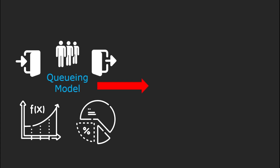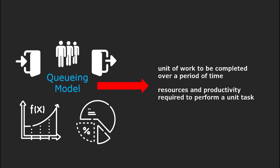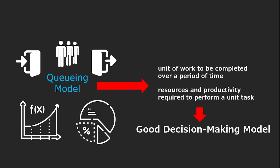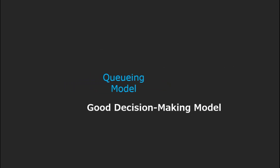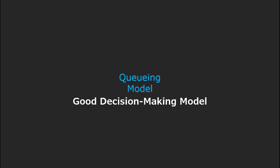In order to apply queuing models to the construction field, it is necessary to define the unit of work to be completed in a given period of time, and to define the resources and productivity required to perform unit tasks. In queuing models, various models can be applied considering the service capability of the server and the customer service request. These models can be used as a decision-making model through simplified expression of the production system and selection of the model concerning uncertainty.